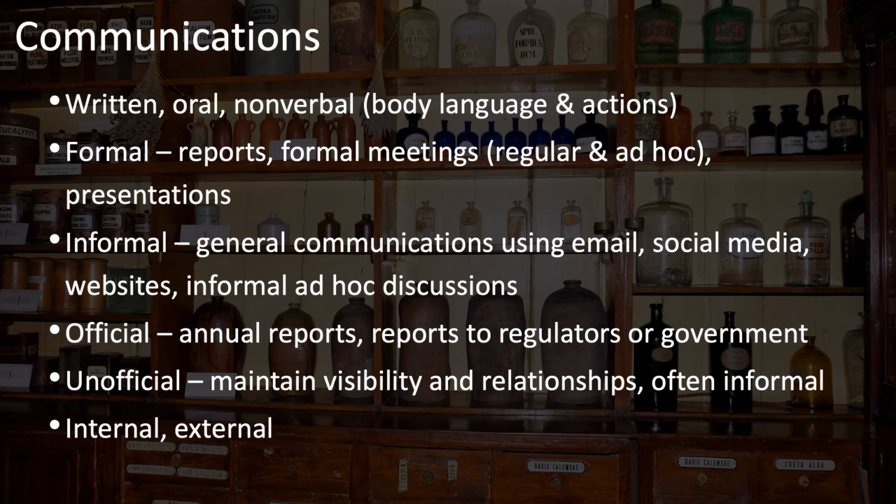Some, of course, will be written. Others will be oral. And also keep in mind the all-important nonverbal communication, which includes not only body language, but other actions that people can take that communicate things. This is especially important in societies that use indirect communication. Sometimes an action can speak much louder than words. For example, if your key stakeholder shows up at certain meetings, it demonstrates their support. If they don't show up, it demonstrates a lack of support.